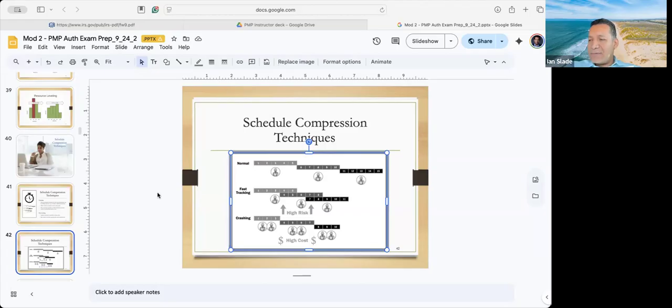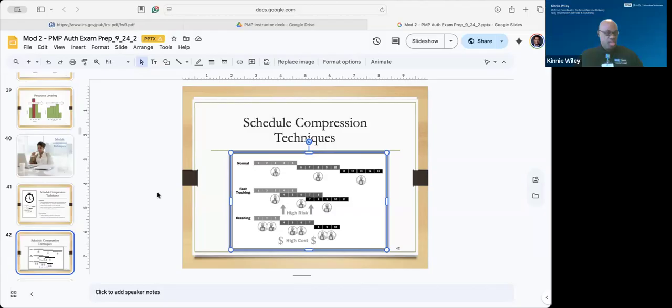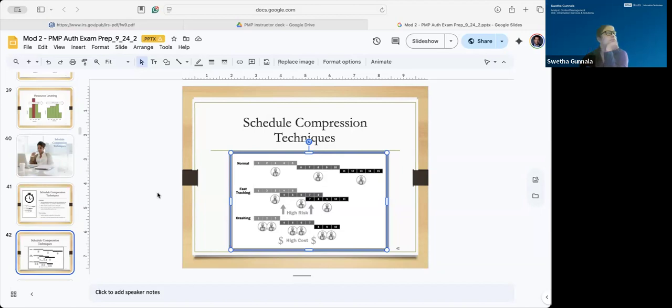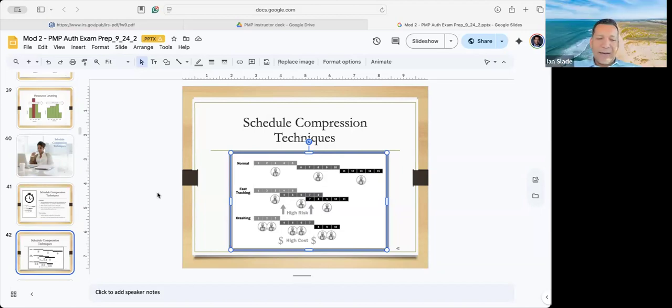If you are going back to the resources, if you are moving the tasks around so that you still finish at the same time, is that smoothing or leveling? Smoothing. Yep. If you're adding more time to accommodate the resource constraints, is that smoothing or leveling? Leveling. Okay. So again, a nice trick or tip to remember is smoothing, same end date. So both S: smoothing, same end date.